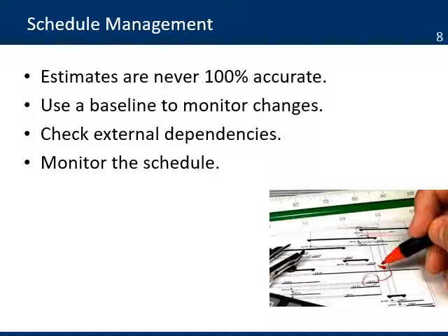Use a baseline to monitor those changes. As you start making modifications to the schedule, the baseline will help you later identify the changes between what was originally estimated and what actually happened. You can use that information in the next phase or next cycle of the project.